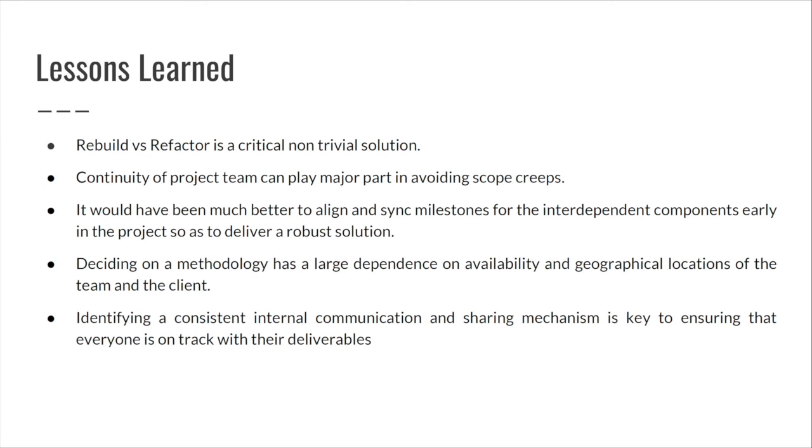I think the rebuild versus refactor was a big decision for us. And I think one of the lessons learned was that it's a critical, non-trivial solution to some problems. We could have easily refactored the existing project and its assets, but we felt that rebuilding it would provide for a better solution that could scale in the future, and also pay off a lot of the technical debt that's been accumulated with the previous effort.